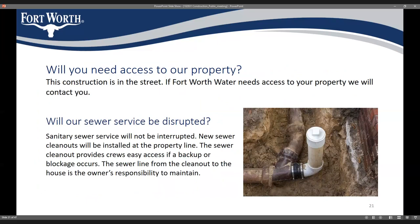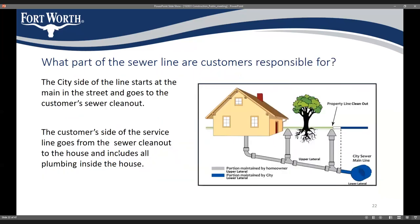Will we need access to your property? Most likely we won't, but in the event that we do, we will let you know before coming onto your property. For sewer services, there's only one sewer on this project and it's going in on Uvalde. Your sewer service will not be interrupted during construction. We'll be installing new services to each property as well as a new clean-out at the property line, as shown in the diagram — we'll install the portion in blue, including the new sewer line, the service to your house, and the clean-out.